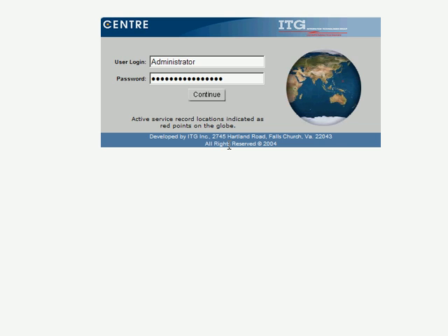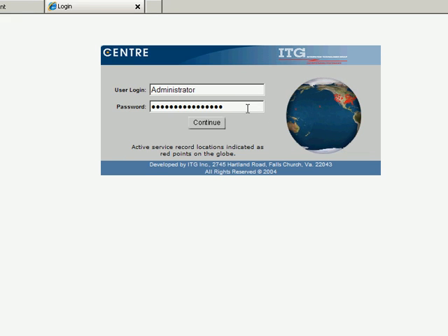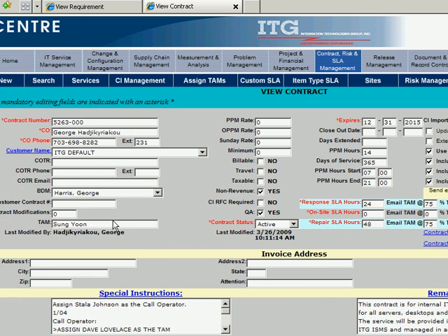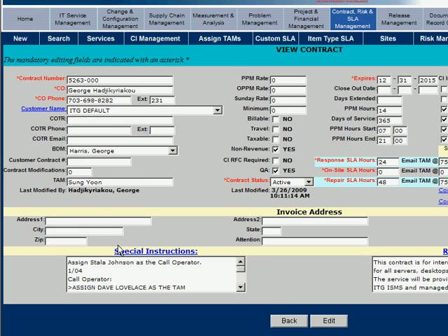Center timesheet management. Timesheet management is part of contract and project management. As a result of the way Center manages contracts, projects, tasks, and resources, and the way those records are intertwined, employees are not able to record their hours in their timesheets unless they are assigned as resources on active tasks with a valid work schedule period allocated to them.